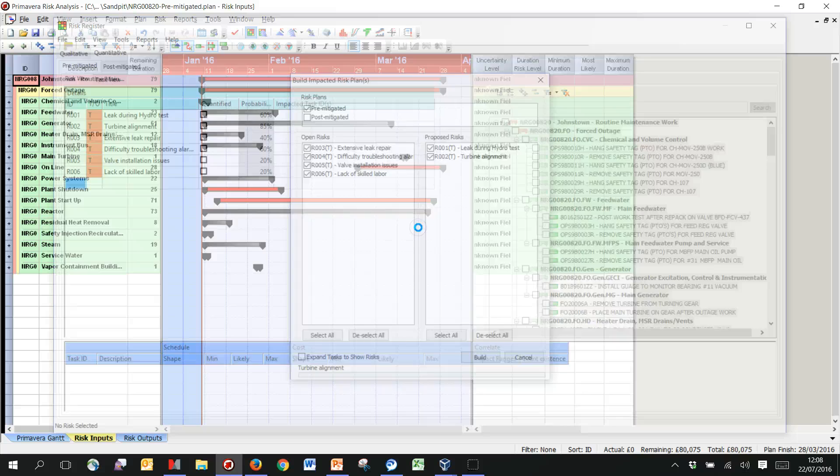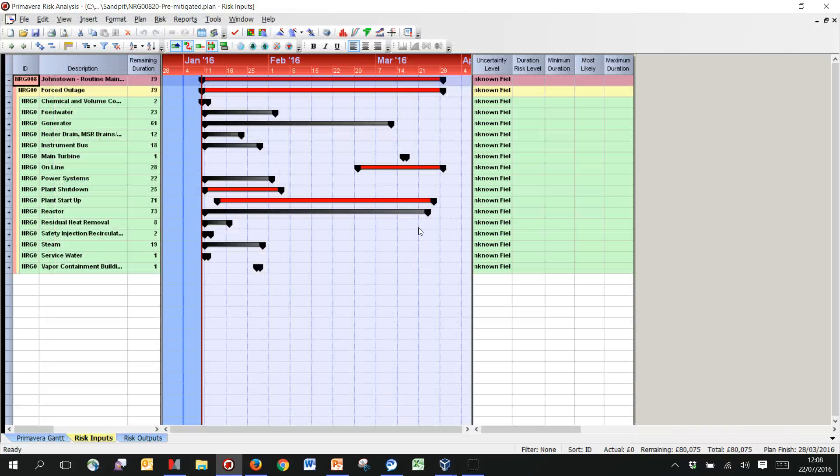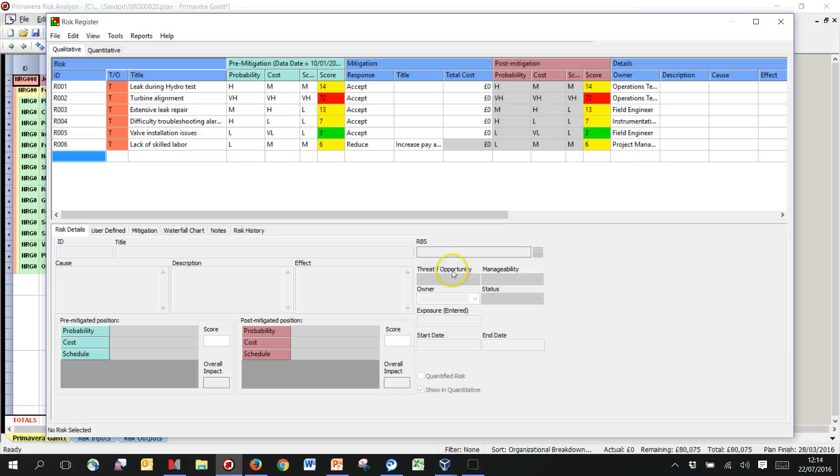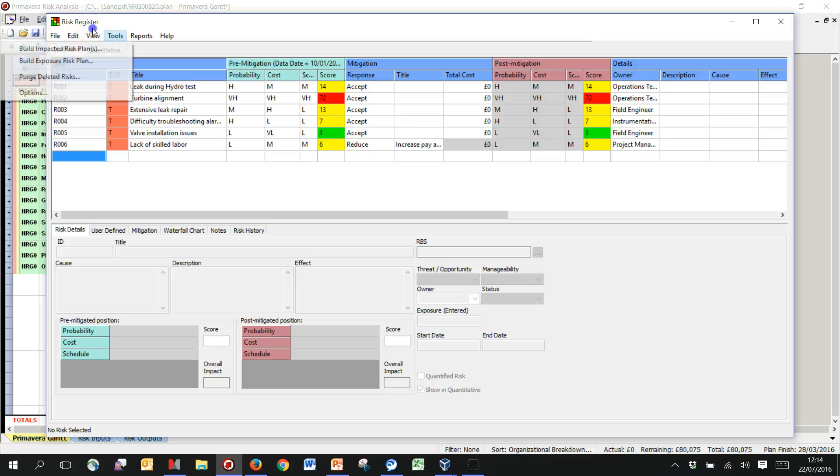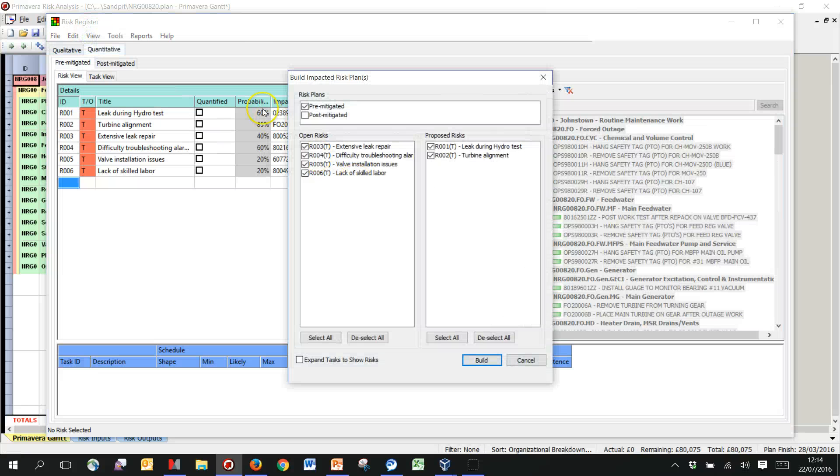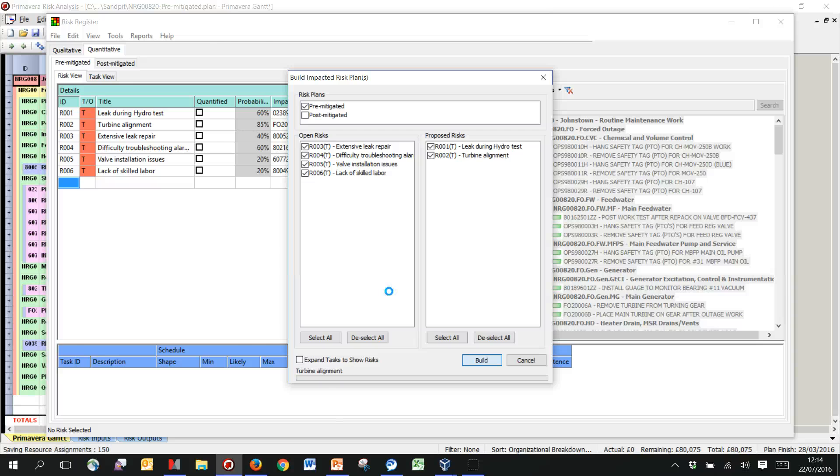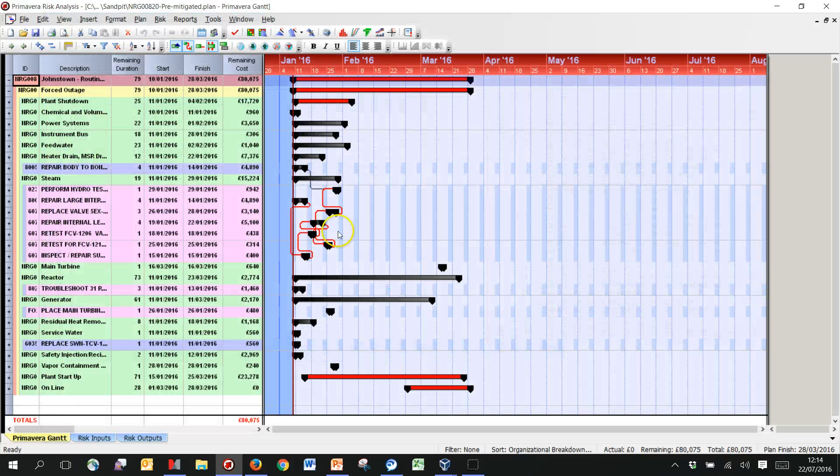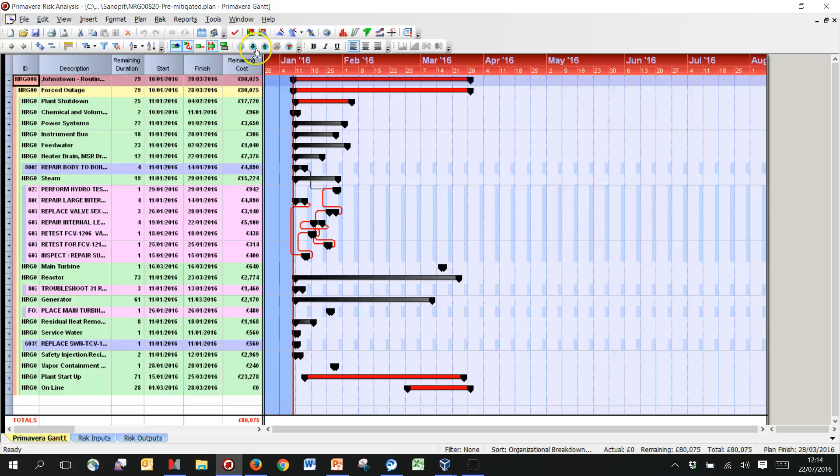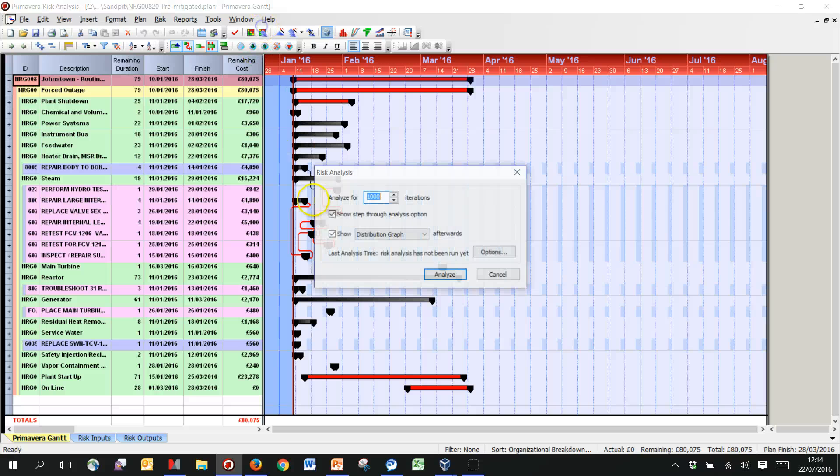Okay, so just fix the links between the risks and the activities. Rerun that building of the impacted risk plan, and this time we have that all work as we would like.